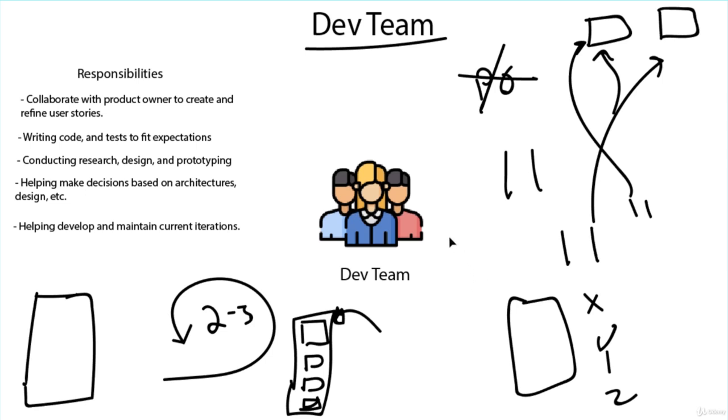The dev team can be from 3 to 9 people. Less than this, and you have small amounts of interaction, which remove the serendipitous sort of experiences and stuff that create better code. There's no checkers when you only have 2 people, stuff like that. So you want 3 people to at least have enough communication that you can solve most problems and make them good solutions. Over 9, you got too many interactions.